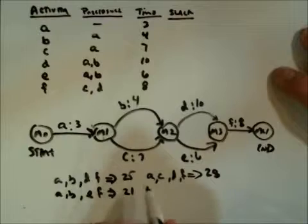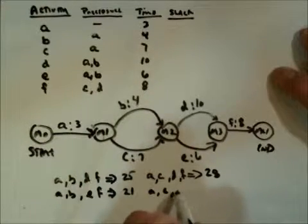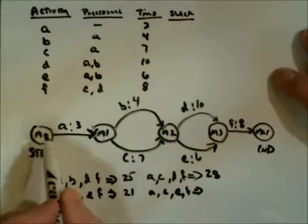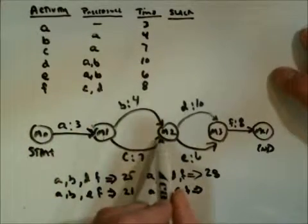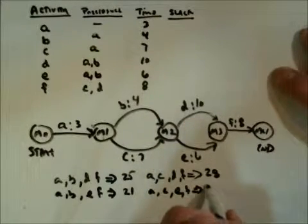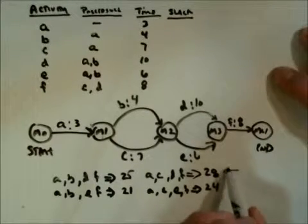And then the final route possible would be A to C, to E, to F, 3. 7 is 10, 6 is 16, 8 more is 24. Now, you see the four possible routes. This one is the longest. It would be the critical path.